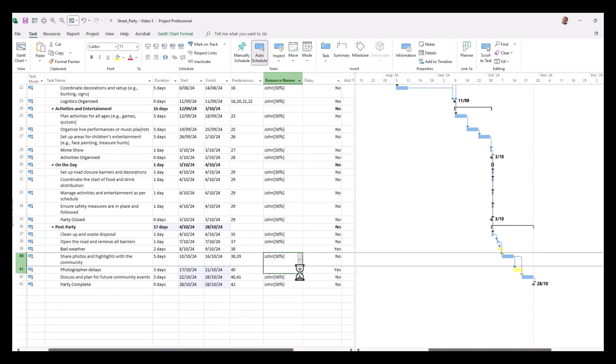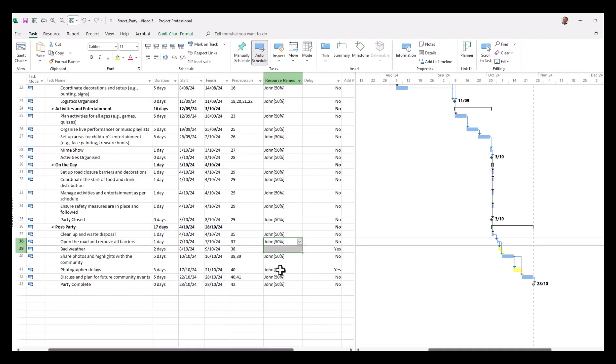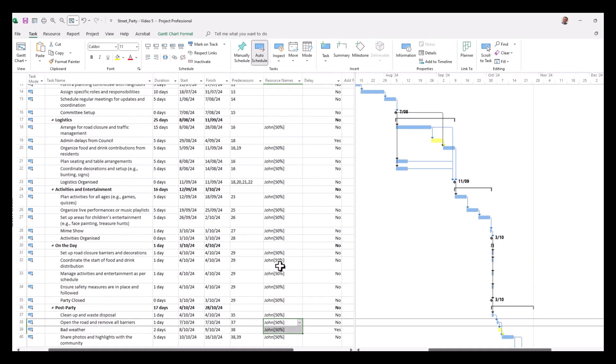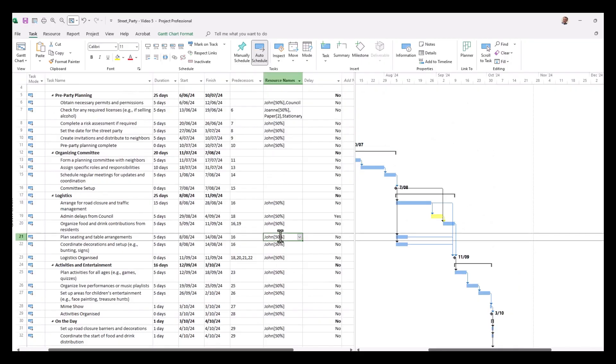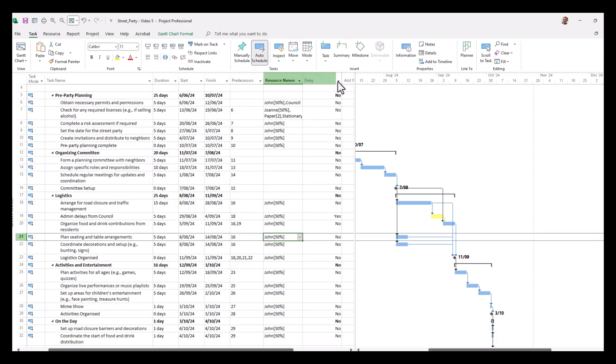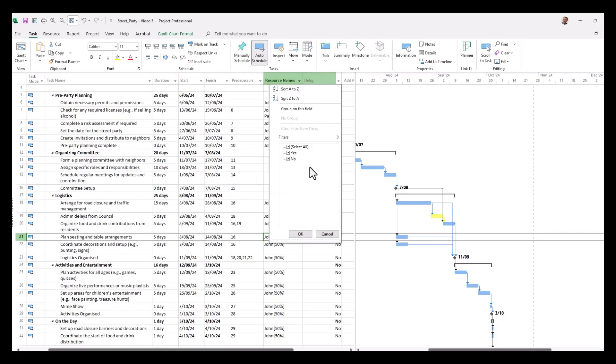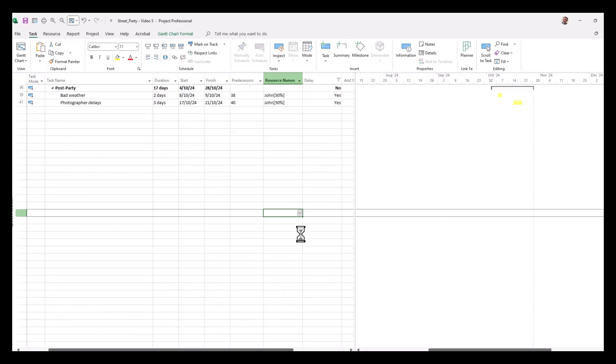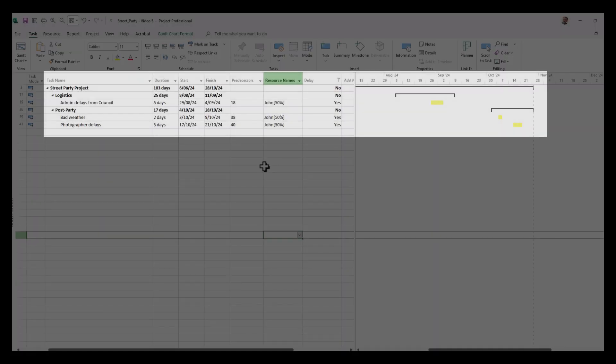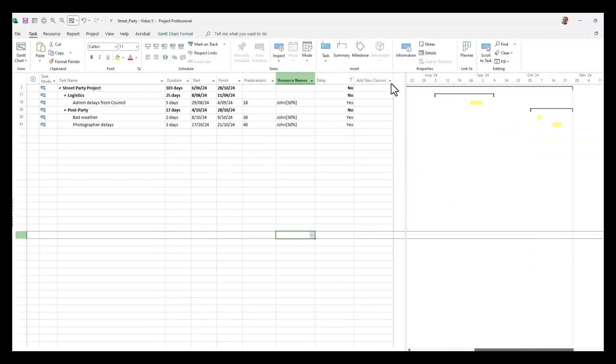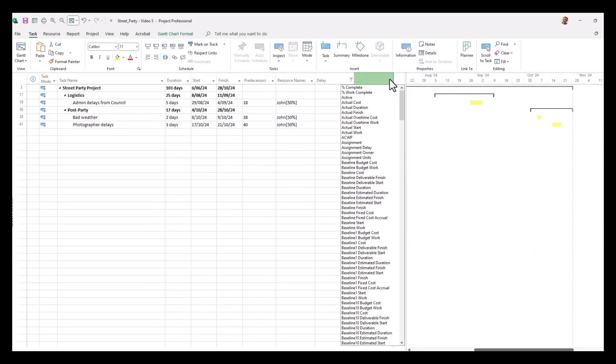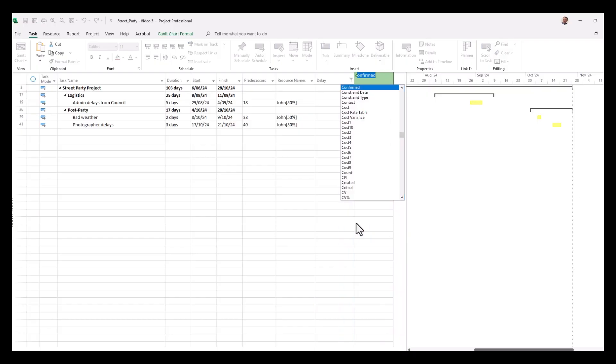So hypothetically we'll also add same resources for simplicity's sake to this project. Now that those resources have been added, we can now go through and filter all of the delays in this project. So let's click on yes and there we have our three delays shown there. Now we can also now go in and work out the cost of those delays by choosing the cost column, and now we've got a pretty strong idea on how much these delays have cost us throughout the project.